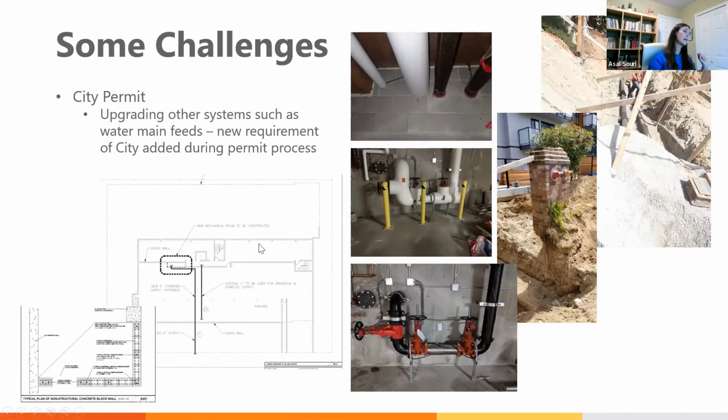The problem was, that's the floor plan view of the parkade, showing pipes running from outside to the mechanical room at the back of the parkade. The existing mechanical room space was not adequate to accommodate the new systems that were required as part of the upgrade. So we had to design and build new mechanical rooms actually inside the garage, making sure no one's parkade spots were compromised and the owners get upset. That simple upgrade, which was part of the permit process, cost the owners, if I'm not wrong, around $130,000 extra on top of the whole building envelope renovation cost.